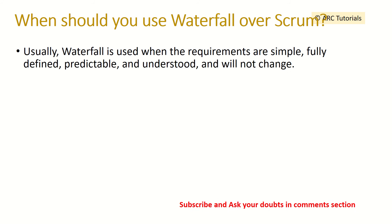When should you use waterfall over scrum? The answer is: if the requirements are simple, straightforward, and will not change over a period of time, then you should use waterfall; otherwise, you should use agile.